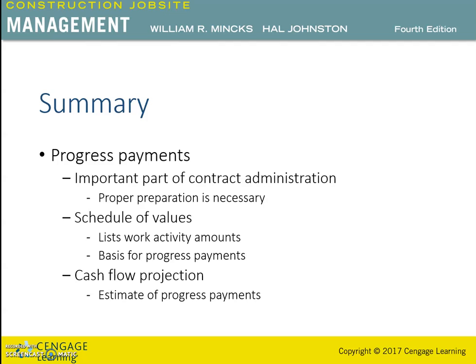The cash flow projection is an estimate of progress payments throughout the project according to the construction schedule. Some construction scheduling software provides cash flow projections. Cash flow projections should accurately estimate progress payments since the owner and contractor make financial arrangements based on the cash flow projection. So most contracts use a standard format for progress payments.